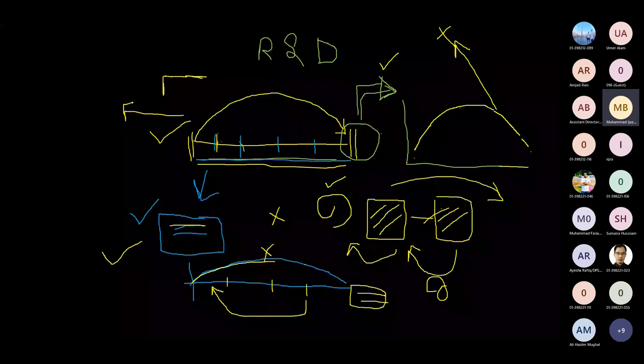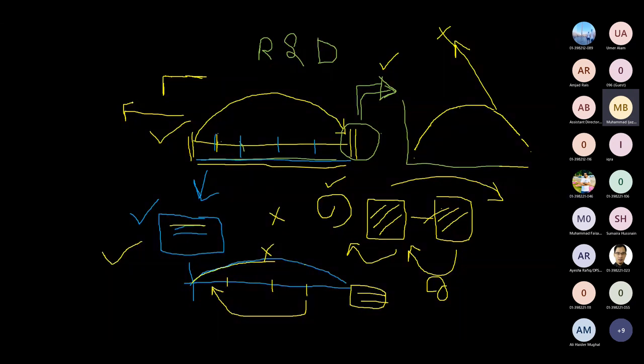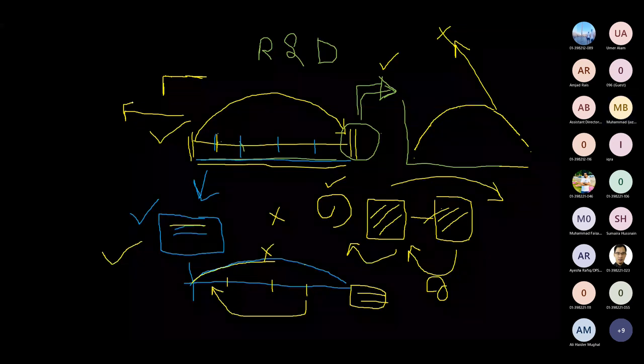So our phases are dependent on our development approach. If our development approach is predictive, we pass through these phases only once. But if our development approach is adaptive, in that case, we will pass through these various stages multiple times. Is it clear?